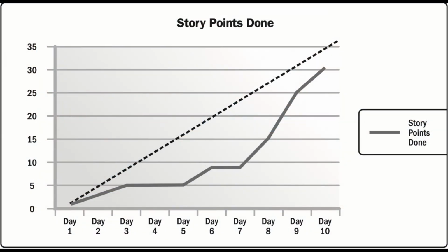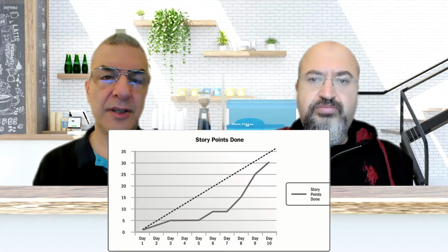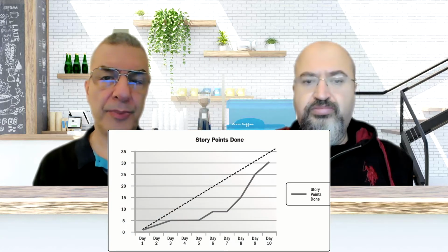Another example is burn charts. Burn charts, such as burn-up or burn-down charts, can show project team velocity. Velocity measures the productivity rate at which the deliverables are produced, validated, and accepted within a predefined interval. A burn-up chart can track the amount of work done compared to the expected work that should be done, as shown on the screen. A burn-down chart can show the number of story points remaining or the amount of risk exposure that has been reduced.